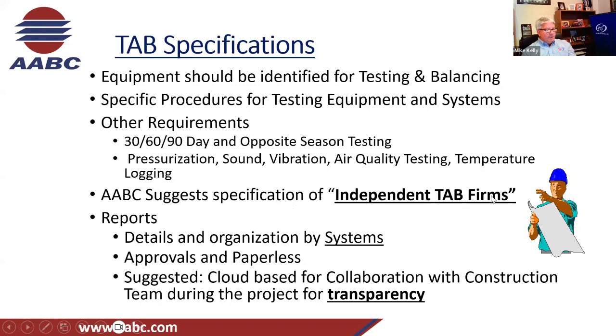Why would you want the same guy that built your house to test it and say it's perfectly operating and running well? You wouldn't. Just like you wouldn't want your air balancing in your facility to be tested and adjusted and come to a firm conclusion everything is good by the guy who installed it. Why would he tell you, man, I did a poor job installing this? You're not hitting the numbers you were supposed to.